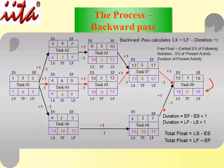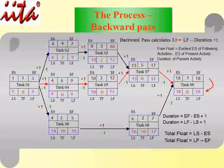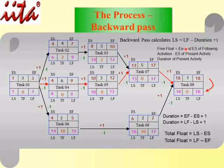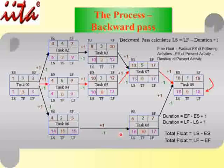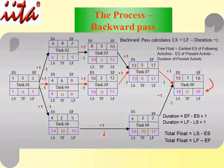Going backward, the preceding task's Late Finish is 17. So we get LF = 17 for those tasks. For Task 7 with LF = 17 and duration = 5: LS = 17 − 5 + 1 = 13. For Task 8 with LF = 17 and duration = 2: LS = 17 − 2 + 1 = 16. Going further back, if a task starts on the 16th month, the preceding task's Late Finish is month 15, so we subtract 1 to get 15.